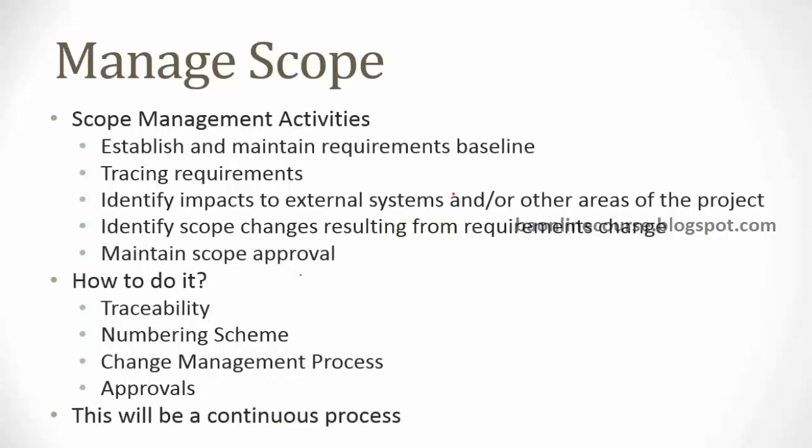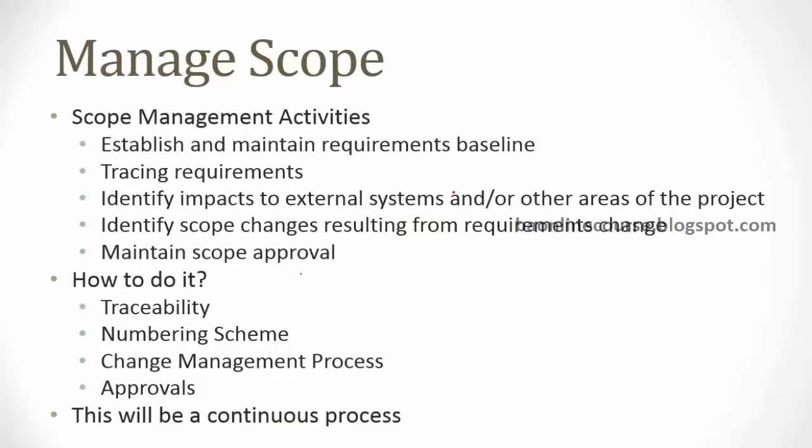If anything more than that has to be picked up, then that has to be separately handled. If anything additional comes in, then it has to be handled as a change request, and then appropriate funding and timelines also have to be adjusted to accommodate for that. Okay, so